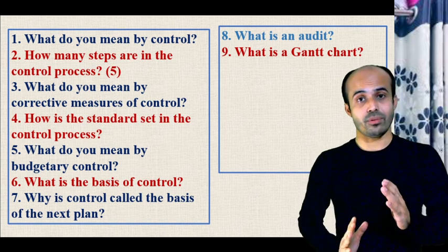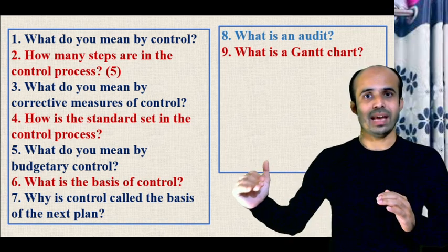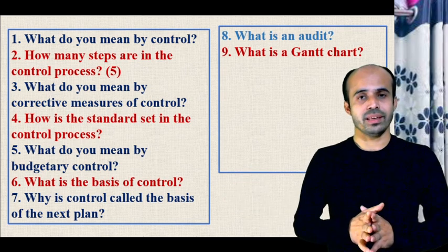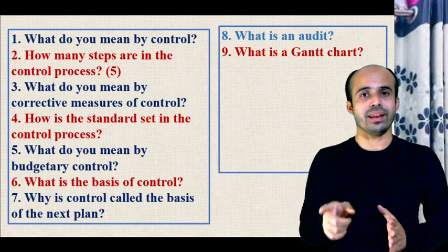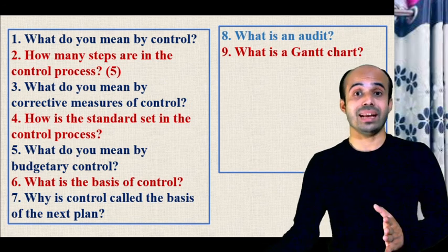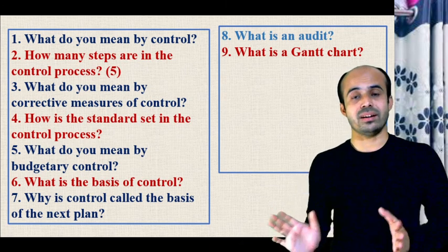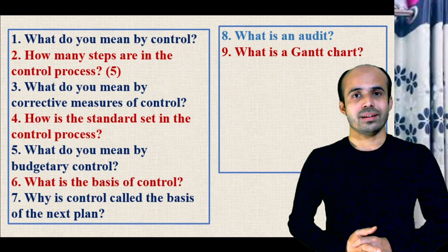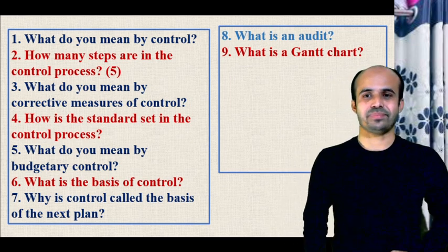Sub-activities are shown in the vertical way and time is given in the horizontal way. The chart also mentions when each sub-work will start and end, and when the other sub-work will start and end. This chart is called the Gantt chart, after the name of Henry Lawrence Gantt.